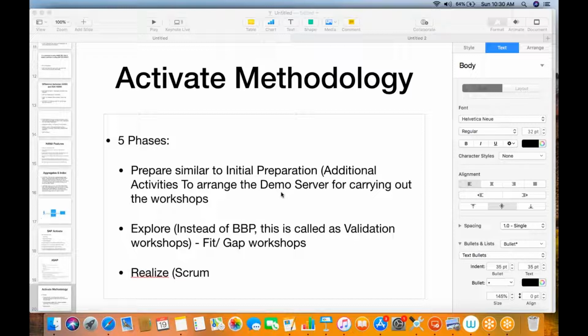So what is a better approach is in Scrum, we are involving the customers on a day-to-day basis. We are taking regular feedback. We are showing them whatever has been developed. Instead of showing everything after 3 months, we need to show them whatever you have done on a day-to-day basis. And if they have any feedback, if they want anything to be changed, it is too early. Customers can tell you there itself, which means you can save a lot of time, right?